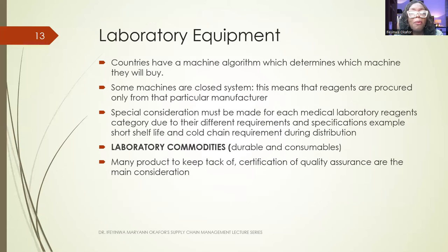Bids are solicited through the issuance of a request. You need to issue a request for proposal. It is not done verbally. Bids are solicited through the issuance of a request for proposal, RFP, unless there are grounds for a single source justification. You don't do that if you have an agreement on grounds for single source justification.